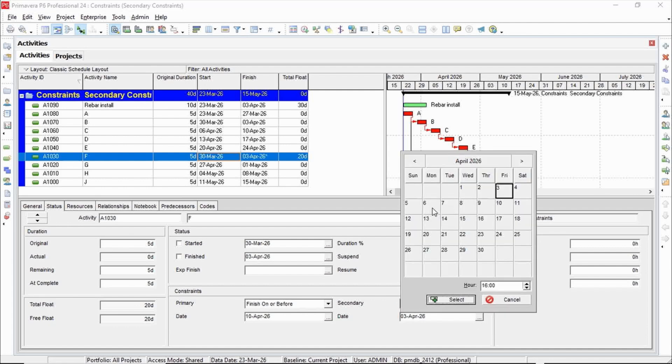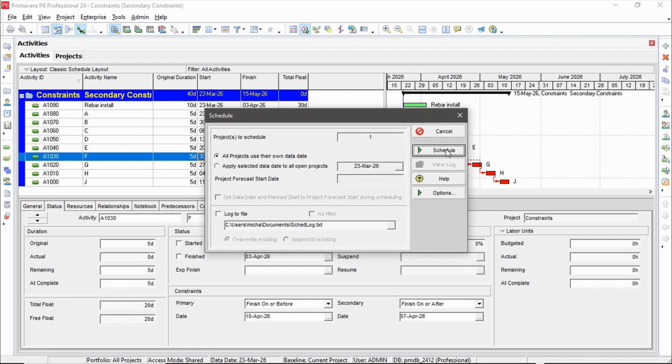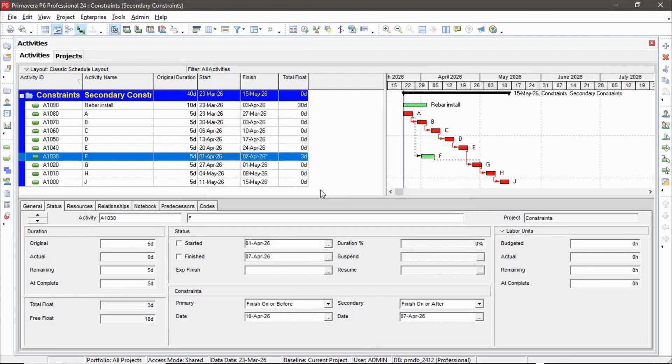So in this case, we will say finish on or after. Let's pick a date like the 7th. So I've provided a range between the 7th or the 10th. And when I reschedule my project, I can see that my total float went down to three days. It was 20 days, and now it's three days because I've provided that range.